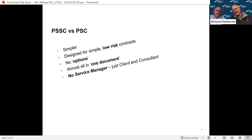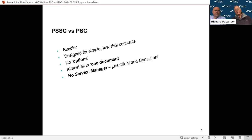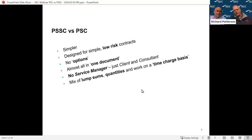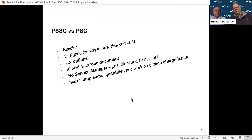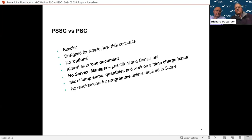The short contract is simpler - it's designed for low risk and fairly simple contracts. We don't have any options in it. It was set up so that you could almost buy it off the shelf and fill in the various parts. We don't have a service manager. PSC4 introduced a service manager as an intermediary between the client and the consultant to do all the day-to-day contract management - doing exactly the same role as the project manager does in the ECC. In the short contract we just have client and consultant.